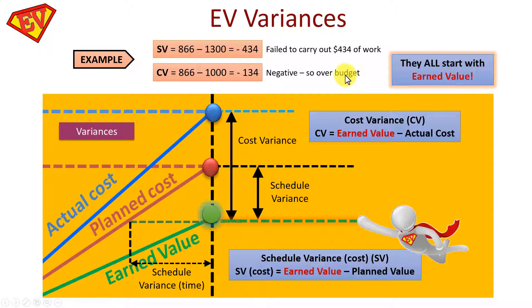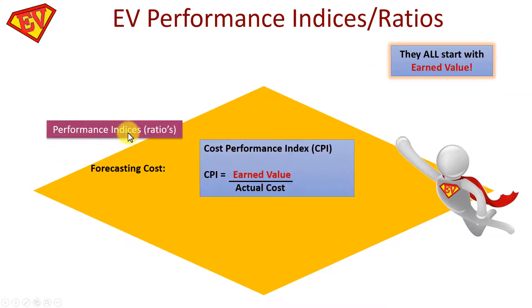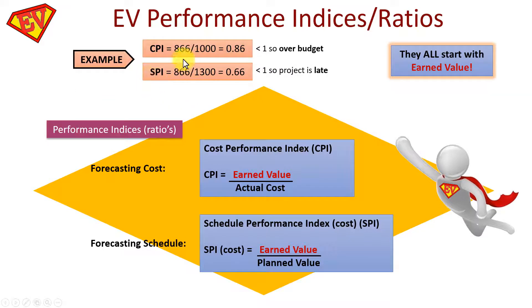For the performance indices, they all start with Earned Value too. CPI = EV ÷ AC, and SPI = EV ÷ PV. Using the same numbers: CPI = 866 ÷ 1000 = 0.86 — less than one, so over budget. SPI = 866 ÷ 1300 = 0.66 — less than one, so the project will come in late. A value of one means on budget and on time; greater than one means you'll underspend or finish early.